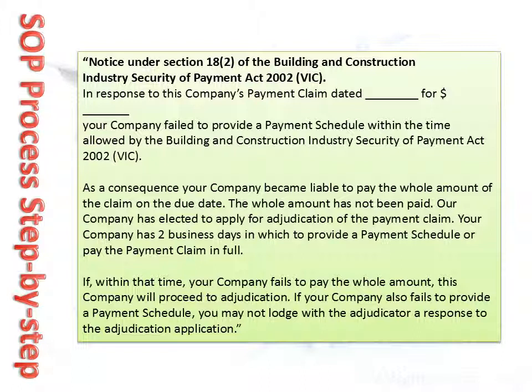If the contractor chooses to go to court, they may ask the court to order recovery of the unpaid part of the payment claim. In such proceedings, the client generally may not raise any arguments in defence or bring a cross-action. The process will usually need the contractor to engage a lawyer and could be costly, especially if the amount claimed is large and you need to go to a higher court. Before embarking on this course, you should consult a legal advisor.